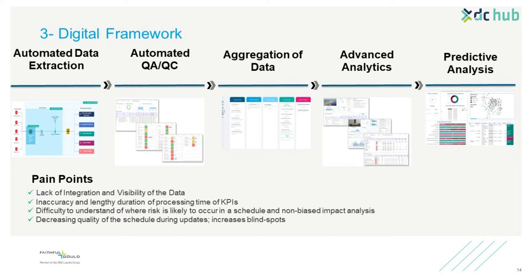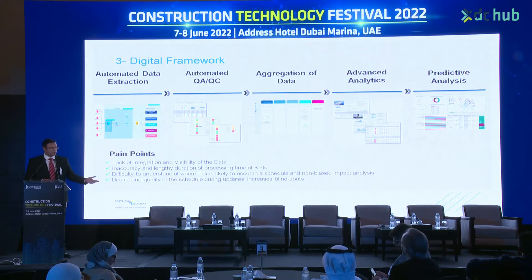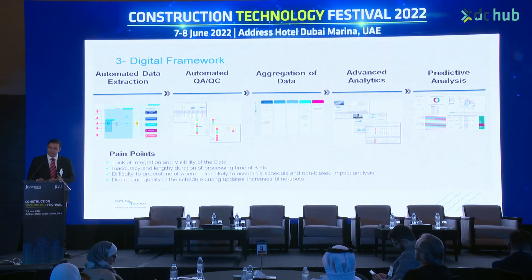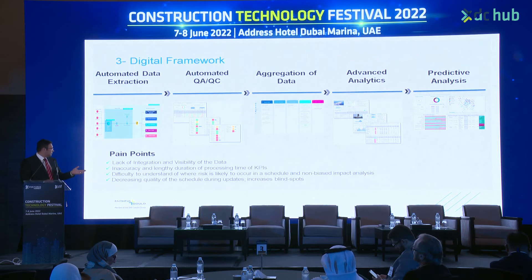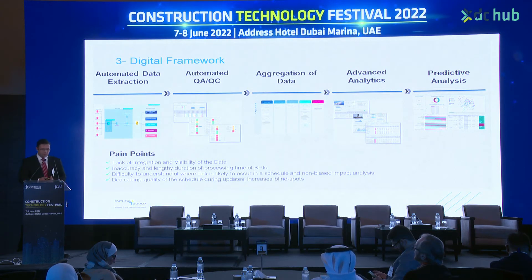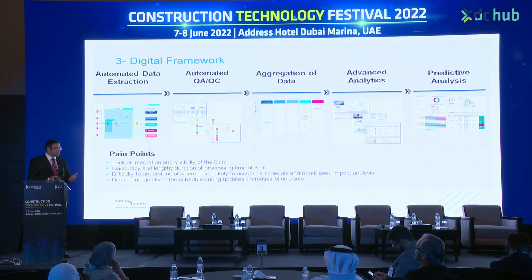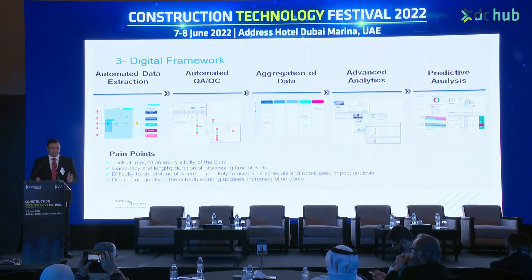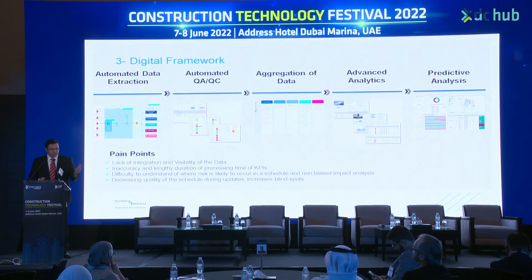We can extract data from in-source, automate quality checks - which is very important for any data you receive, otherwise you will have challenges - aggregate the data, analyze it, and build predictive analysis based on activity names, total float, successors, predecessors, and all those attributes. This addresses pain points around lack of integration and data visibility, inaccuracy in duration and KPI processes, and difficulty understanding where risk is likely to happen. It supports a non-biased approach because you set the rules - any data model is better than a subjective approach - and helps us maintain schedule quality.